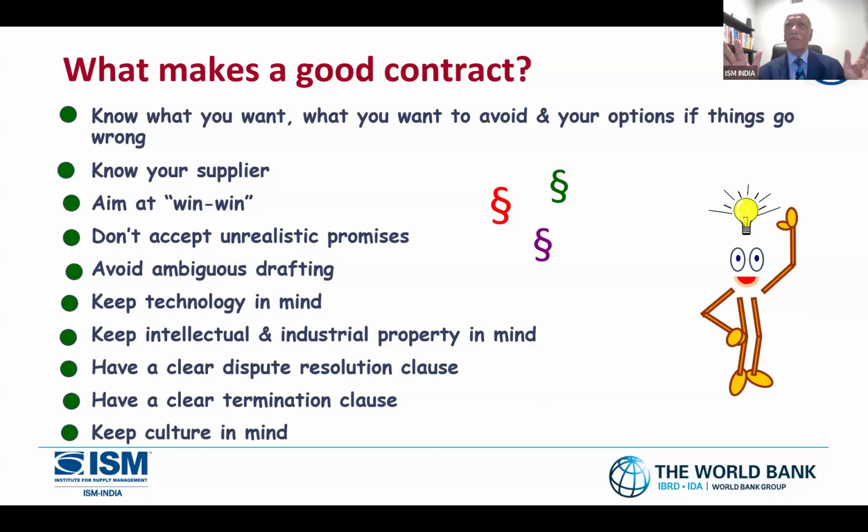One thing I always tell people: if you're getting into a contract, you must protect your back. You must have a clear termination clause so that in case the worst happens, you should be able to say bye-bye. If you're going into the trenches, you should know how to get out of it also. So a termination clause for convenience or for some other good reasons should be there. Without a termination clause, don't try to get into that. Keep culture in mind. When you're signing a contract, culture could be language, culture could be habits, culture could be many things.